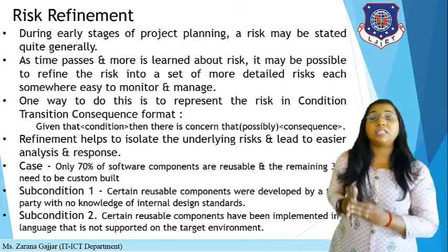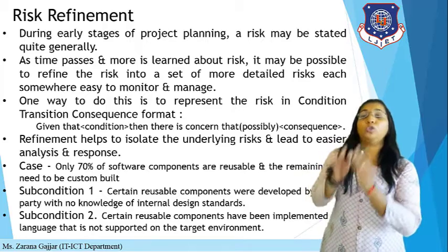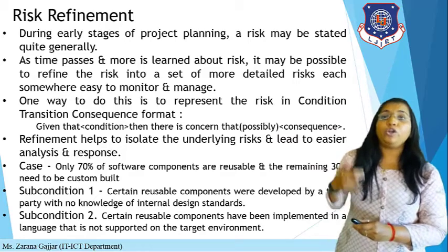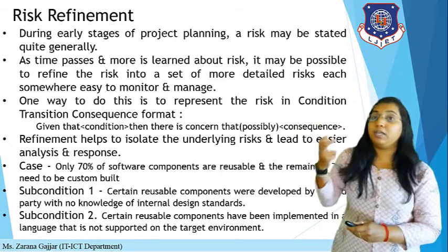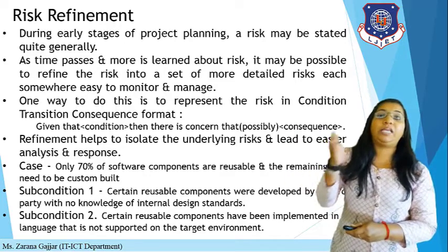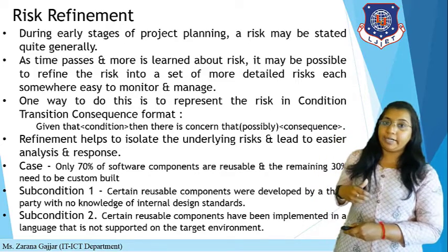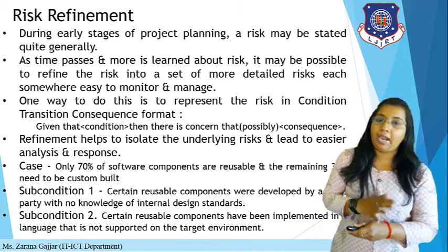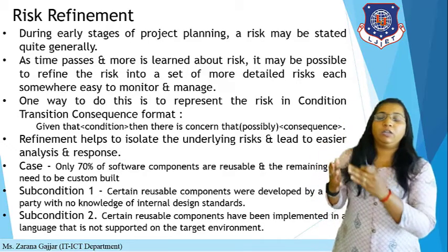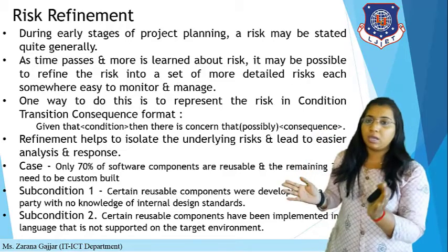Now let's discuss risk refinement. You have already identified the risk, and you have also estimated the risk cost. Now you have to refine the particular risk. During the early stages of project planning, a risk may be stated quite generally. As time passes and more is learned about the risk, it may be possible to refine the risk into a set of more detailed risks, each easier to monitor and manage. If the customer gives you some requirements, then based on them you analyze which are feasible and finalize the customer requirements.